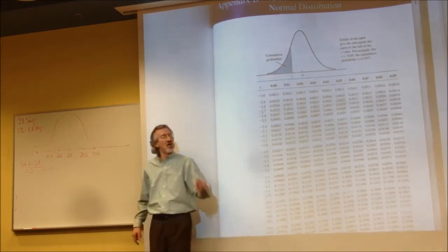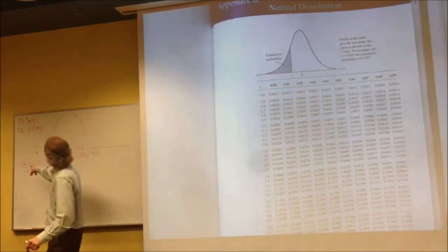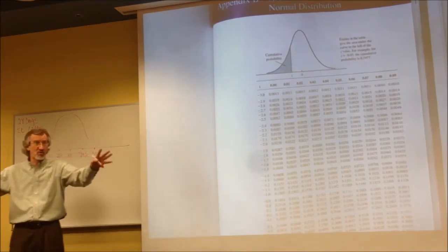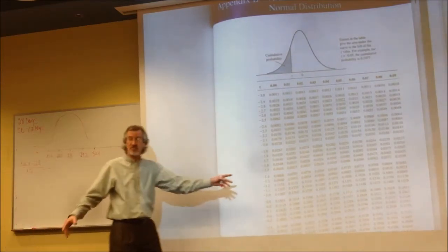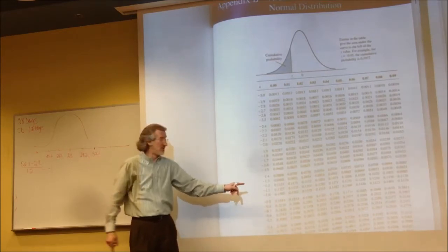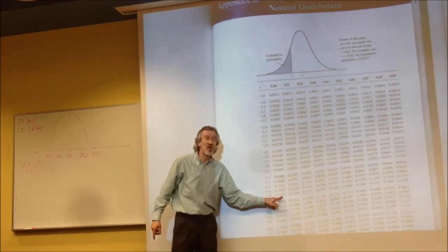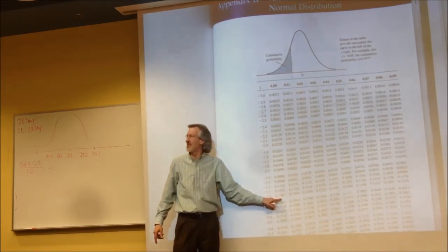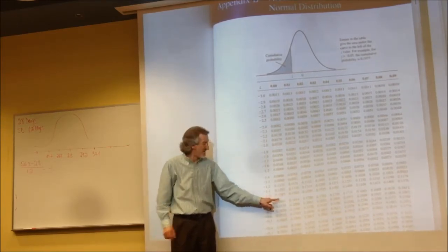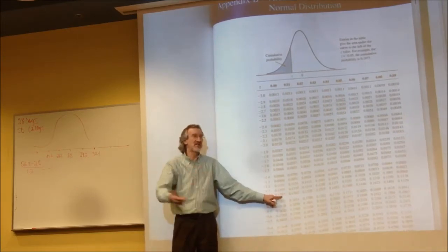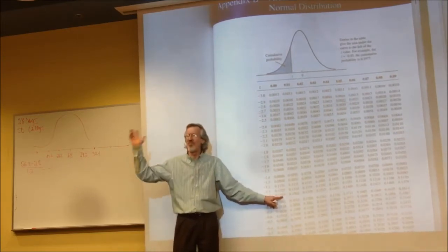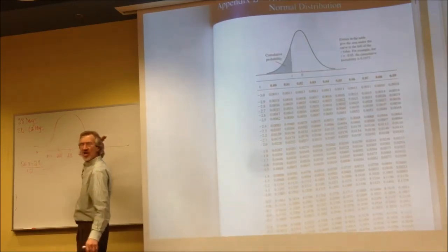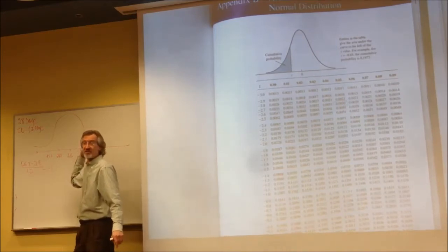So if I said to you then, what's the probability it's going to be 26.8 days or more? Should be very simple for you to quickly say the opposite, exactly. And what he just said was, 100% minus 15.87. What'd you say, 83? I thought it was 7. Oh, okay. Which would be 100% minus that is about 84.13, I guess. Is that right? So there's about an 84.13 chance that it's more than 26.8 days.